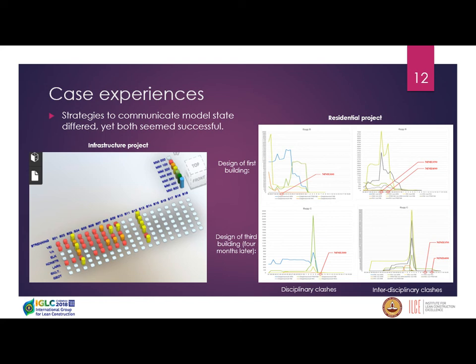And why this is relevant is that MMI levels 300 and 350 had the requirement of having no relevant collisions either within the specific discipline for the MMI 300 level or between disciplines for the MMI 350 level.